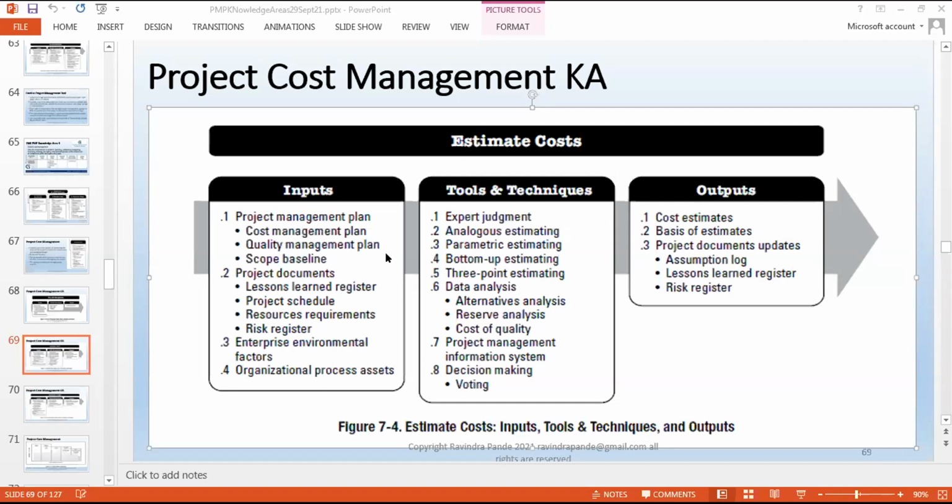An Agile tutor might tell you this is a mindset, not a framework and all. Say yes to that. But normally it's a framework that we use, in terms of using a particular template, a particular discipline, even for a meeting or something of that sort. In such a scenario, we use a daily project review meeting within the team and the client's major stakeholders. And these meetings are normally what we call a stand-up meeting, to be concluded in 15 minutes. That's a discipline Agile Scrum project management methodology brings to you.